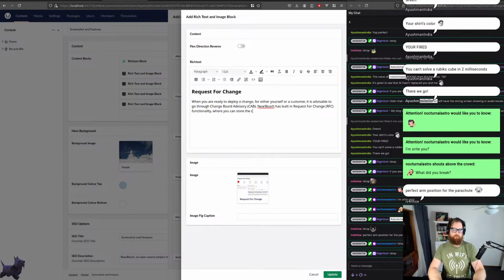The outline of the change, the change task list and who is responsible for those changes, the timeline of the change task list, risks involved with the change, backout plans, implementation plans, time, and so forth like that. All right, cool. Update. I need to reverse that one.